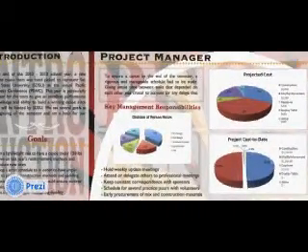As project manager, I was responsible for creating a project schedule for the team, leading weekly update meetings, and distributing members to work on tasks that they were not directly responsible for, and I was also the lead in the Capstone class. As project manager, there were several milestones that the team needed to complete in order to accomplish our goal of constructing the canoe by the end of the semester. Some of these milestones were finalizing the hull design, the construction of the hull, finalizing concrete mix, determination of the structural reinforcement, practicing casting methods, and lastly, reach the deadline for the first scheduled pour.